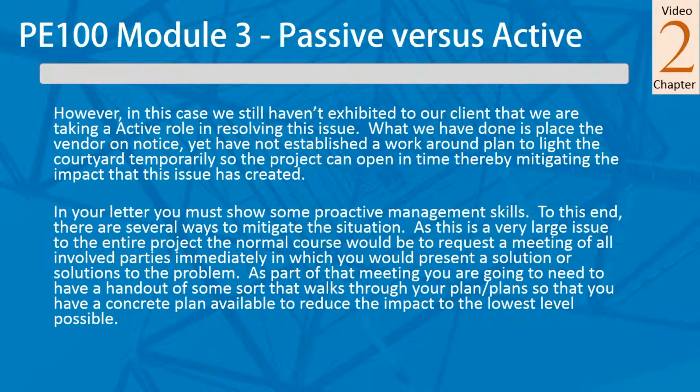And at that point, the meeting is there because all the other parties are going to have to agree on all these crazy workarounds that you're going to do and see if it really will even work for them. So here again, now we've seen this letter grow into, now you've got to have a mitigation plan. You're having to write a letter to the vendor and the manufacturer indicating what they're doing. So you've really gotten into a much higher level of communication and types of communication. So now we've got 3 different types of letters, types of written communications, all related to this one issue.